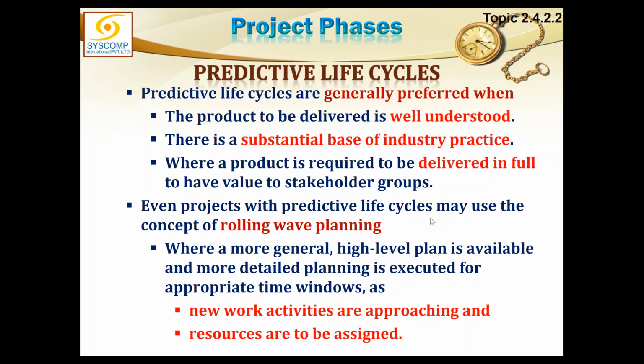Even projects with predictive life cycles may use the concept of rolling wave planning. Rolling wave planning, you understand? As we move ahead, we keep planning in detail. So yes, we know everything up to a certain level of detail, but if we keep learning something new, we will keep adding that to our plan subsequently through rolling wave planning, where a more general high-level plan is available and more detailed planning is executed for appropriate time windows as new work activities are approaching and resources are to be assigned. So any such changing environment could even be accommodated in predictive life cycles.